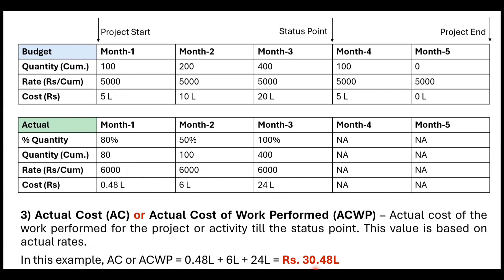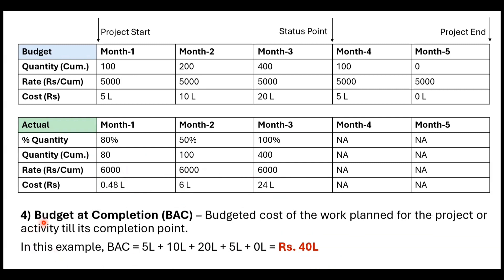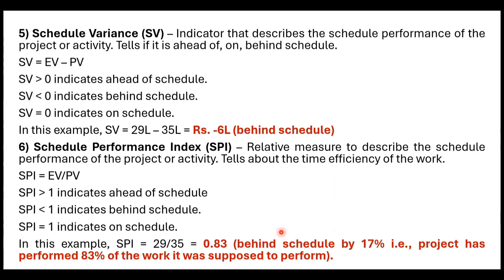Budget at Completion (BAC) is the budgeted cost for the complete activity or project till its completion point. Referring to the budgeted cost table: ₹5 lakh + ₹10 lakh + ₹20 lakh + ₹5 lakh + ₹0 lakh = ₹40 lakh. This is your Budget at Completion. Now moving to one very important parameter related to schedule — Schedule Variance — which requires PV and EV.